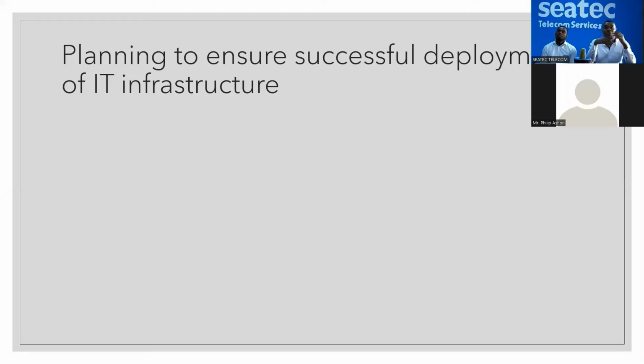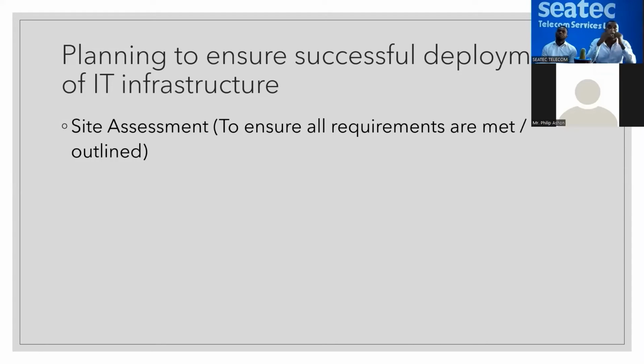So I'm going to talk about a few things you should consider while planning, and then I'll also tackle actual implementation. To ensure that the deployment of your IT infrastructure goes well, it is tempting to think, oh, sales and marketing went to do an assessment before the sale, or your colleague George went and validated the solution design. But upon implementation, it is important to still go to site and ascertain what has changed. Have the requirements changed? There are instances where we've been told sales and marketing is in this office, and by the time you go, the place has been changed to a conference room.